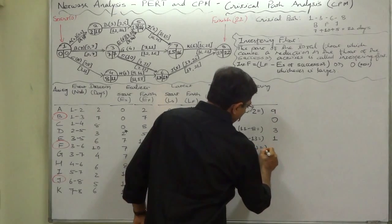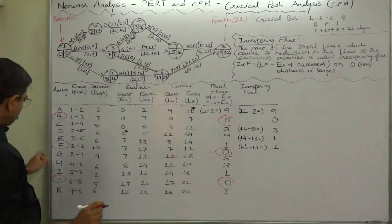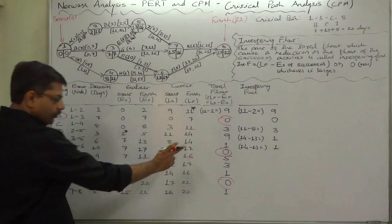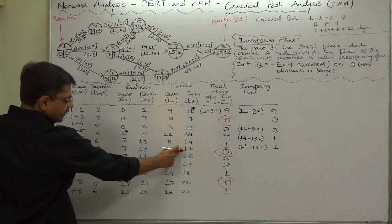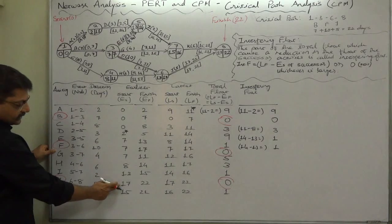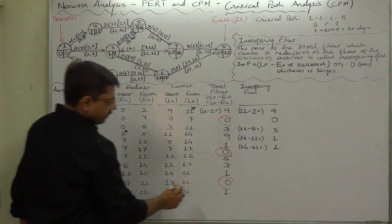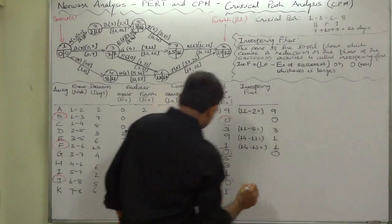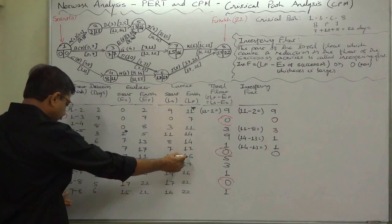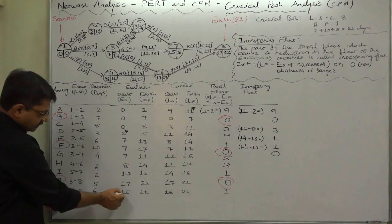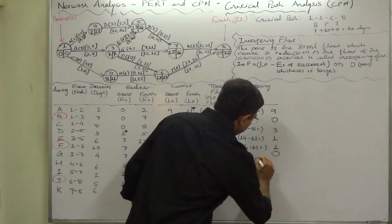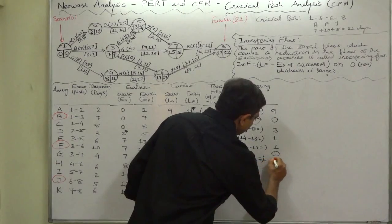Now F: it will be 0. You can check - latest finish time of F is 17, its successor is J, earliest start time is 17, so 17 minus 17 is 0. G: latest finish time is 16, its successor is K, K's earliest start time is 15, so 16 minus 15 equals 1.